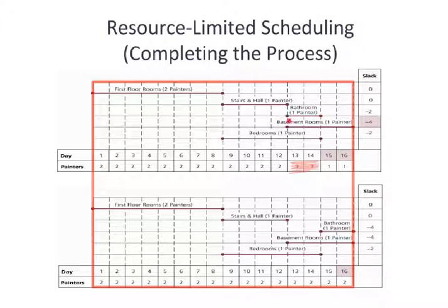So we're going to shift this smallest item that's only a 2-day item, and we're just going to shift it over a little tiny bit, from days 13 and 14 to day 15 and 16. In so doing, we can actually balance the resources without extending the duration further. If we, however, had shifted this one, which is 4 days, we cause more problems than good in doing that shift.